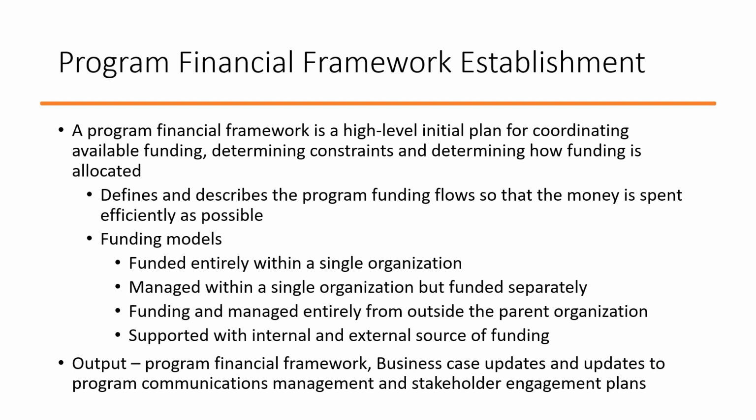You can get support from internal or external sources of funding. You can source it internally, from a parent company or from cash flow. You can source it externally from a bank, venture capitalist or private equity. It could be funded entirely within a single organization, or the fund can be managed within a single organization but funded separately. You may source the fund externally and have multiple organizations within an organization, but manage them as a single organization. So funding and fund management are two different activities. And funding and management entirely from outside is also possible. That is also one type of model.